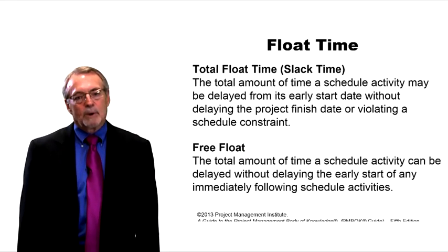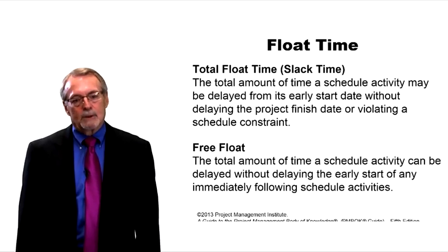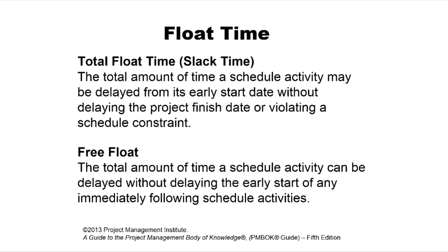And we also have 2 ways to talk about float time. One of them, the total float time. In a series of tasks, there'll be some total float time. So in our route from Dungara to Marble Bar to Darwin, there's an extra hour. It doesn't mean that there's an extra hour in the route from Dungara to Marble Bar and another extra hour from Marble Bar to Darwin. It means that totally those 2 have an extra hour.